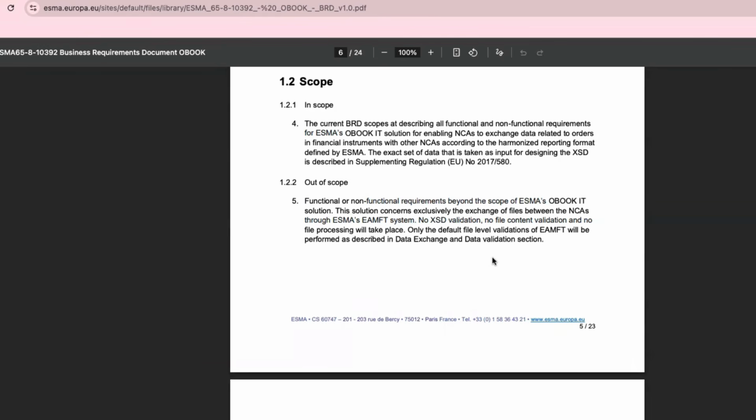The only time I was able to defend myself and my team was with these emails and all the call recordings. So I replied with that recording. I attached that recording, and I very specifically pinpointed that at 20:02, business told us it is out of scope. Now they want that to be added, right? I attached that call recording, tagged that timestamp, included my project manager, and said, see here, she told me this is out of scope 3 months back.